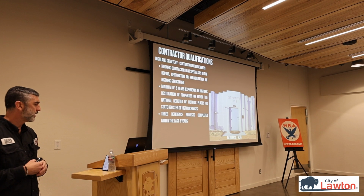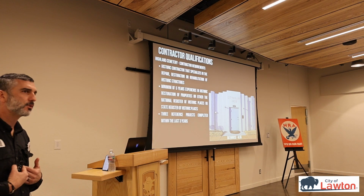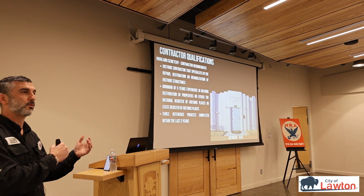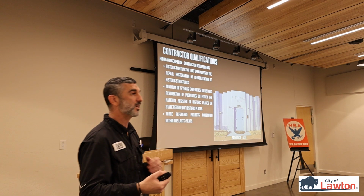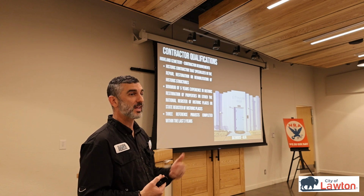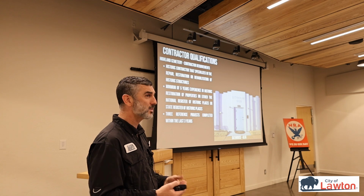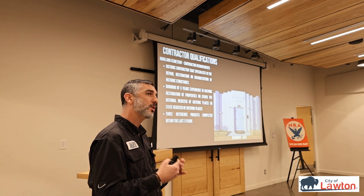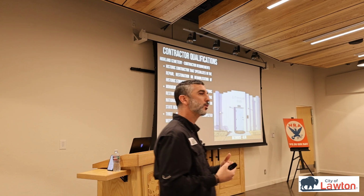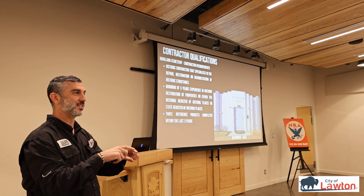A couple of the things that I like to add as additional considerations that are my preferences to give to people are, do they have general liability that's going to cover the type of work they're going to do? Because a lot of these small to mid-sized projects are going to land below the threshold of your large-scale construction management companies. Many of them don't want to come out and do a project of that size, but it is also slightly above the professional qualifications of your typical residential contractor. And there is a weird space in insurances that lands in all of that.